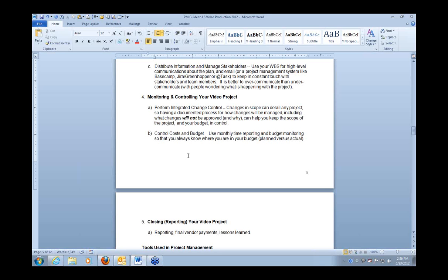And then you can just keep it in Excel, saying here was the planned budget and here's our actual costs, so you can know where you are at any given time across the life of your grant in terms of your costs and budget. That's a great thing to know, to see if you're tracking as planned, or if there could be things coming up that weren't planned, but you have time to address any budget fluctuations or differences as you move through the project,